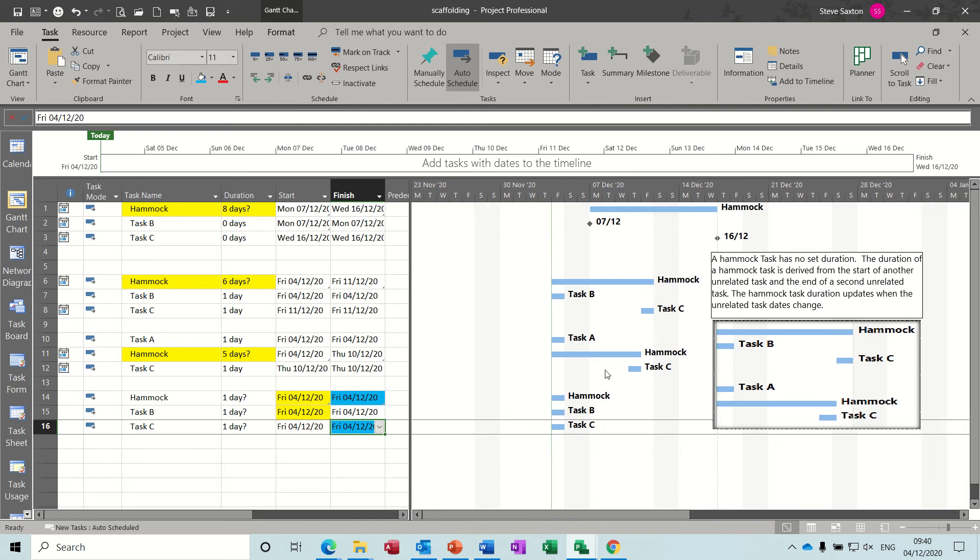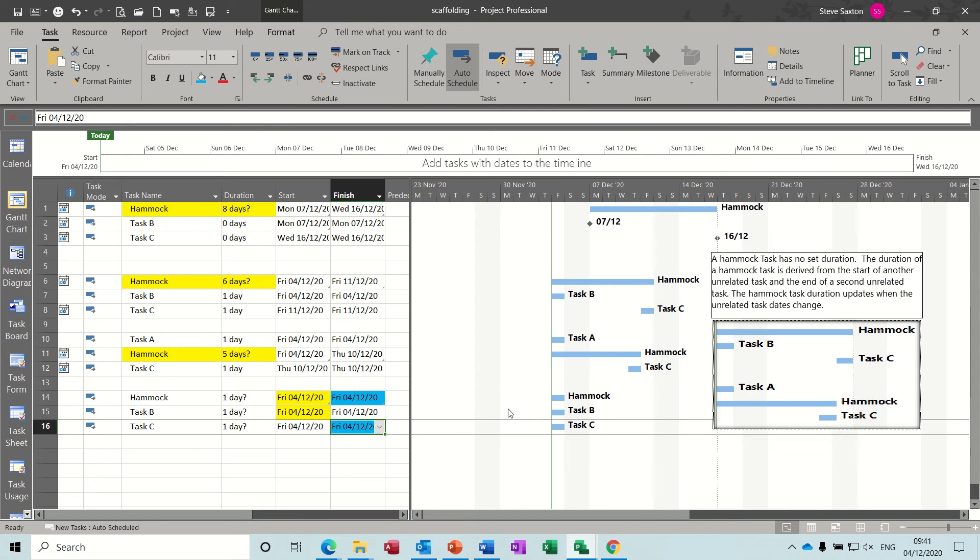So that's how you set the thing up. Now when any of these task durations change, so if task B start duration changes and the end duration changes, or either/or, the hammock should react to it. So at the minute they're all starting on the same date.